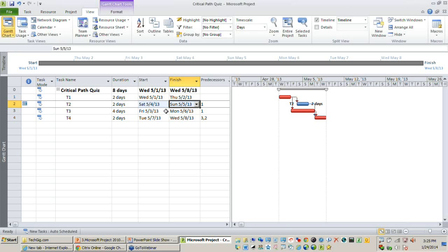So it looks good, right? But what happens now is for this activity, there is a constraint that has been put. If you observe on the extreme left, there is a small calendar indicator that has been displayed that this task has a start no earlier than on the selected date, which means even if T1 completes on an earlier date, T2 is not taking advantage of it. So without knowing what constraints are, people fall into a trap of changing dates either in the start date or finish date, which I will say is not good from a scheduling aspect.